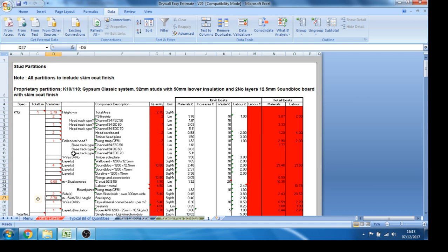If we want to make our rate even more specific, say if we had a 2.4 metre ceiling height and we decide we want to include skim to 2.5 and then fire tape above, we can just type in the skim height we want in there, and that will include skim to 2.5 and fire tape above. We've got the option of including the corner beads within the rate or separately, so we're going to assume they're measured separately. Take that out.